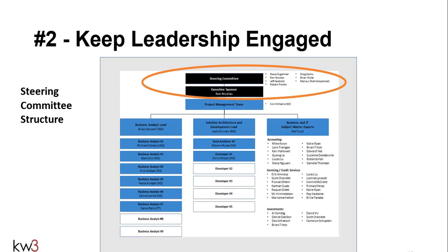And what we do is establish a weekly meeting, 30 minutes or less, hopefully less, where we hit on some of the key points from the status, and we'll talk about some of the dashboards in a second, but give a red, yellow, blue status on where we're at, talk about the key points from a status standpoint, the risk areas, and where we need their help. Ultimately, this puts in a regular routine on a weekly or bi-weekly basis with all the key folks to review the same status, to get their input, and make sure we're on the same page.